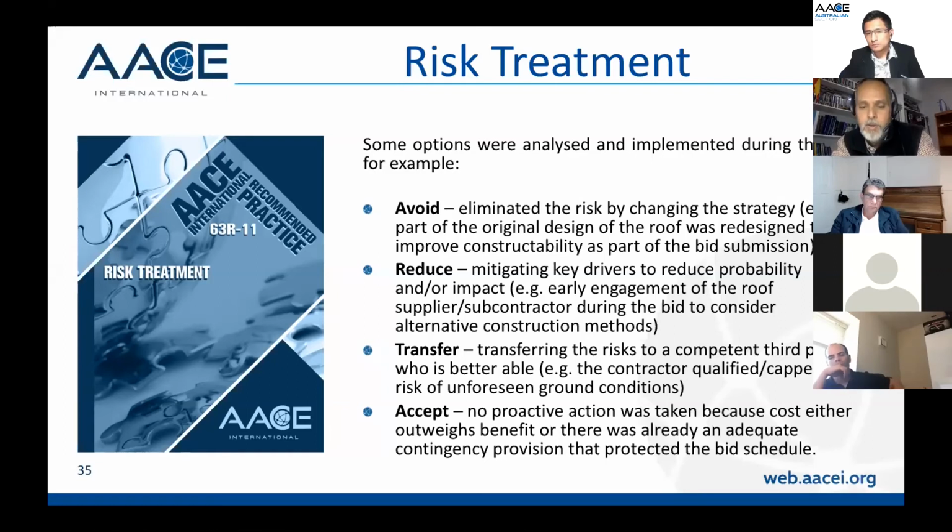or cap. In this project, we qualified something like the unforeseen ground condition. We said to the client, look, there is not sufficient information from the site investigation. So we are happy to take up to 5 days of impact in the project, but no more than that. More than 5 days, we would like to get a time and cost compensation. So we actually qualified this as part of our proposal.